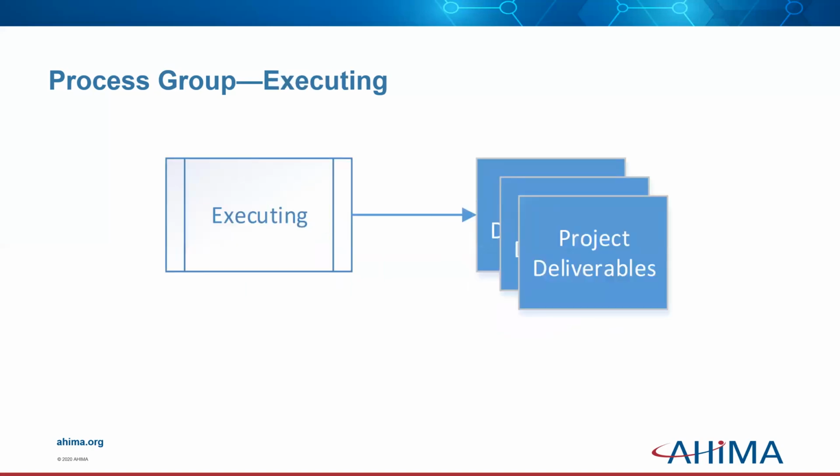Now, project execution begins during the end of the planning phase. The project plans are carried out and the project work products are delivered. This phase includes forming the project team, purchasing supplies and materials for the project, inspecting the project deliverables for quality issues while they're being produced, communicating with the project stakeholders, and managing the expectations of all project stakeholders.